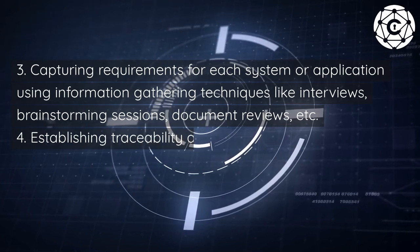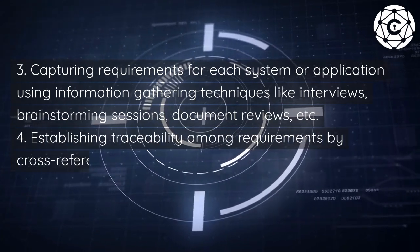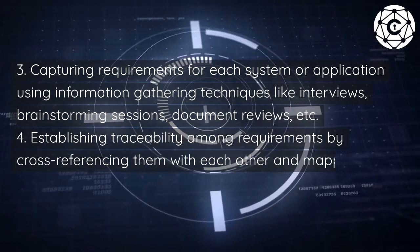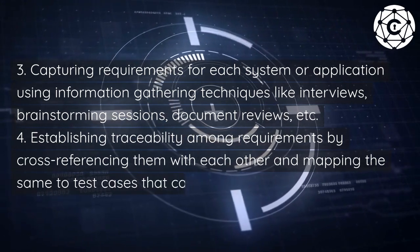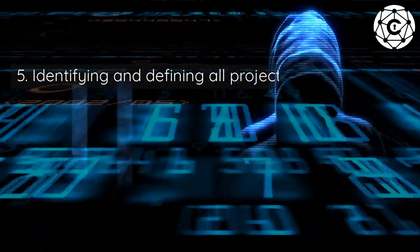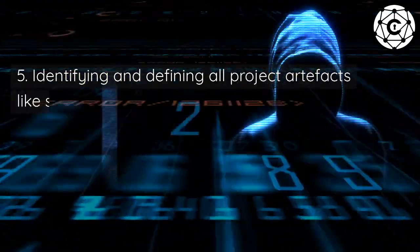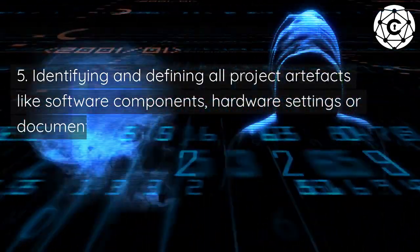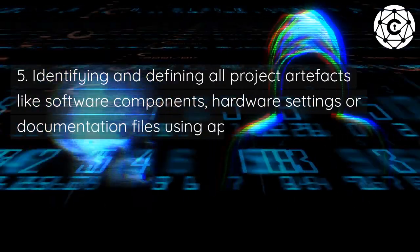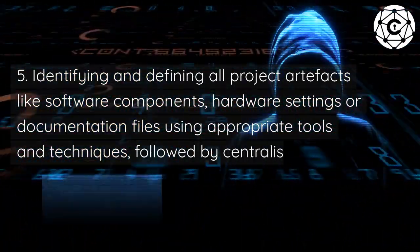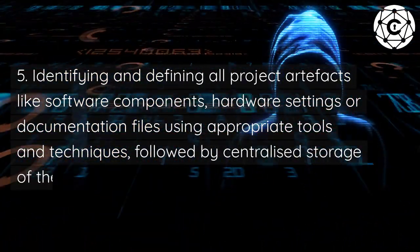Step 4: Establishing traceability among requirements by cross-referencing them with each other, and mapping the same to test cases that can be applied against them. Step 5: Identifying and defining all project artifacts like software components, hardware settings, or documentation files using appropriate tools and techniques, followed by centralized storage of these documents.